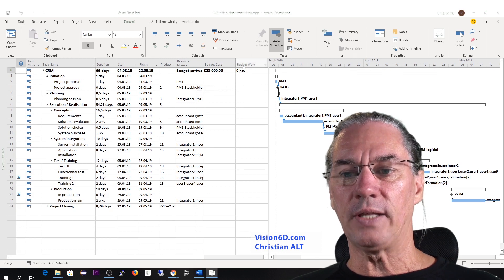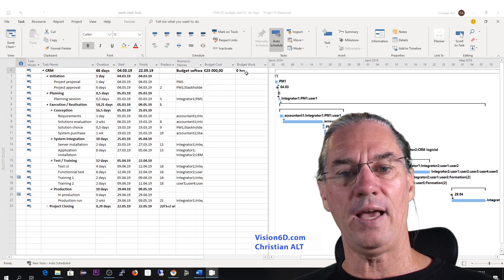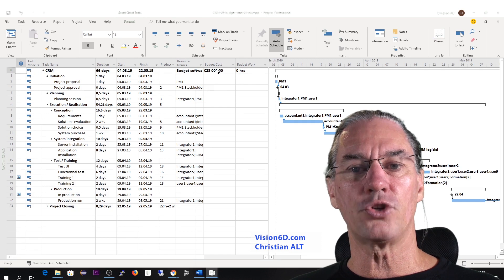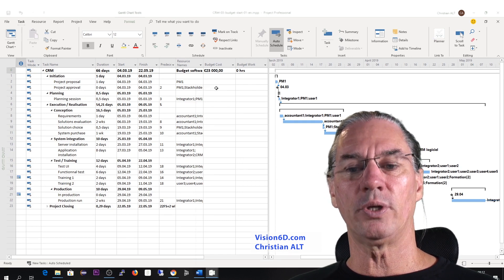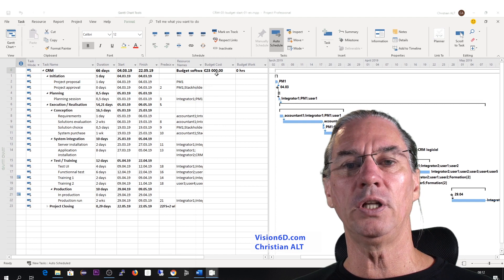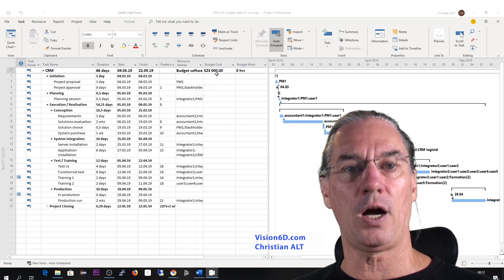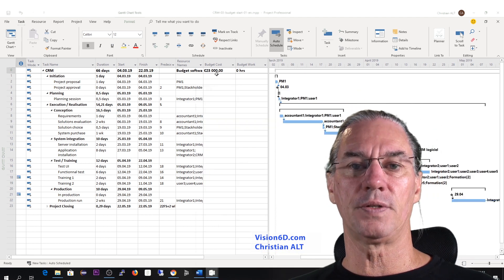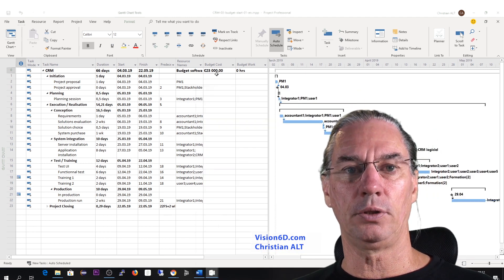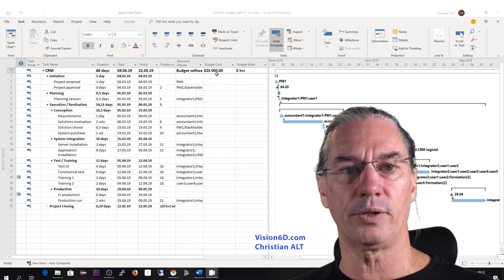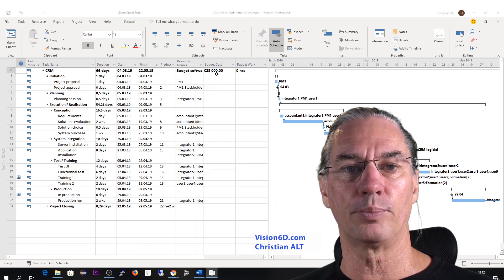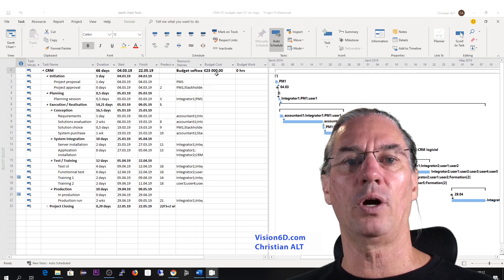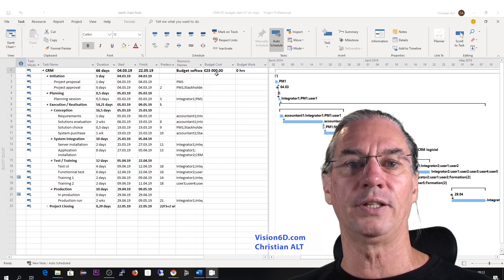But you see that working hours, we still don't have anything. At this point, I can say that for a lot of projects, this is really the way they present the budget — they only count the costs. In some companies, they don't count the internal resources; it's an arrangement between departments which are involved in the project. Other companies really count the number of hours that co-workers will be involved in the project.